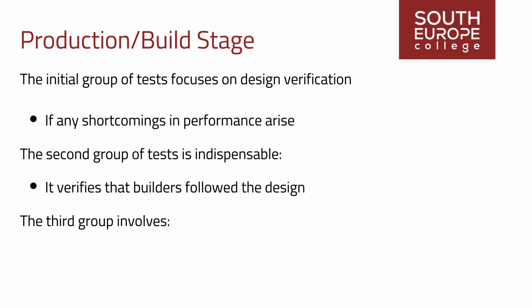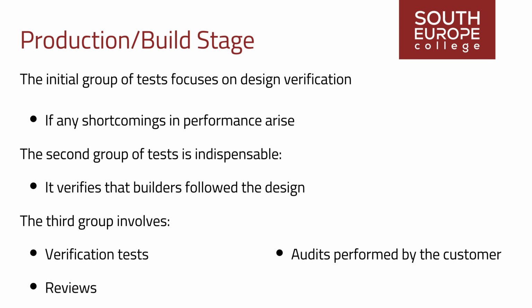The third group involves verification tests, reviews, and audits performed by the customer. Their objective is to ensure the fulfillment of user requirements, the completeness and accuracy of test documentation. User personnel, unlike design engineers, may uncover difficulties in system operation or induce failures that were not identified in the initial tests.